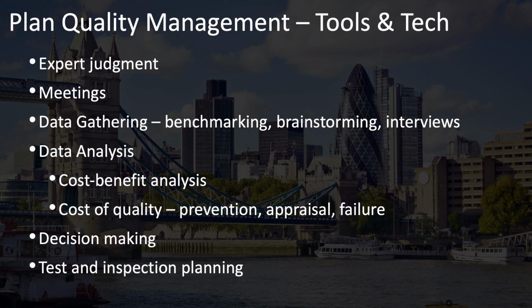Data analysis includes cost-benefit analysis, which you can use to compare alternative approaches and assess which quality controls are the most beneficial and cost-effective for your project. Quality management plan should be based on a strong foundation of detailed analysis of the cost of quality, including the costs of prevention, appraisal, and failure associated with different approaches and tools.